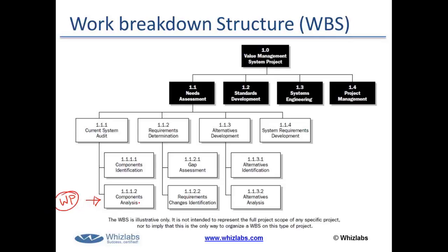These are the work components which can be completed within 8 to 80 hours, and they are called the work packages. Now let's say we have hundreds or thousands of work packages in this WBS, and we cannot really go to the granular level in order to control scope or do the estimation, etc. So we rather do the monitoring, controlling, estimation, etc.